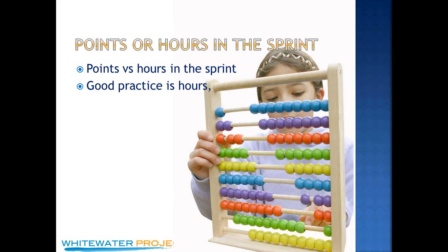Why wouldn't you do that? Well, one of the reasons is just what I was talking about. If you use points and don't use hours as the measure of work within the sprint, then when someone is out for a day in a 10-day sprint, being out for a day is a lot, right? That's 10% of the work you can contribute. If you are one of 5 people on a team, that's a lot of work that doesn't get done, right? 10% of 1/5 of the team is a lot of work that's left undone. So I wouldn't want to use points because of that.